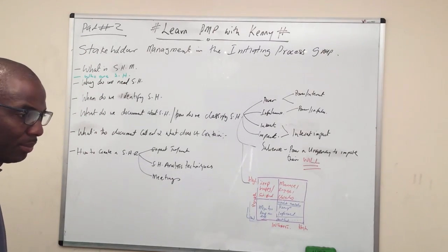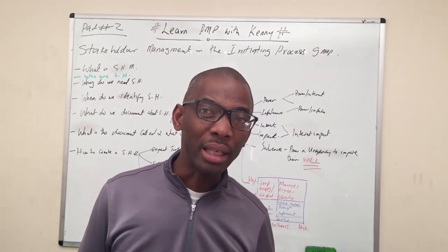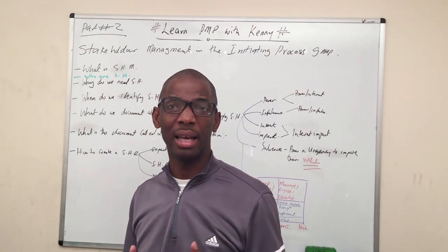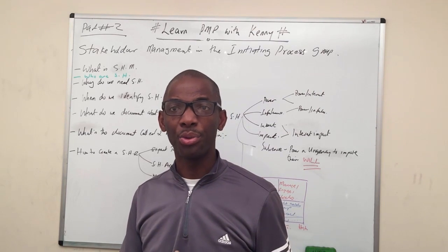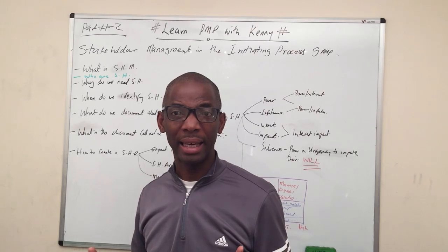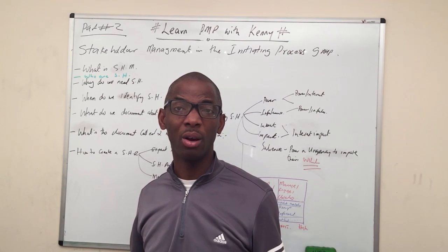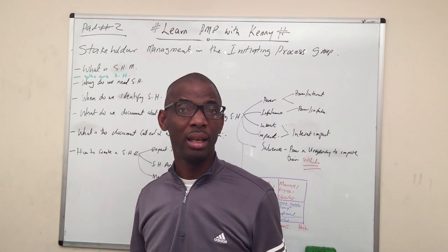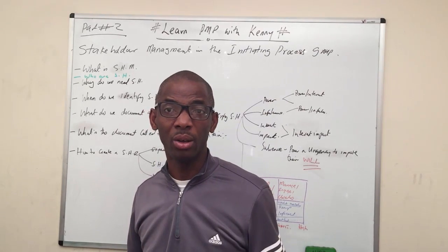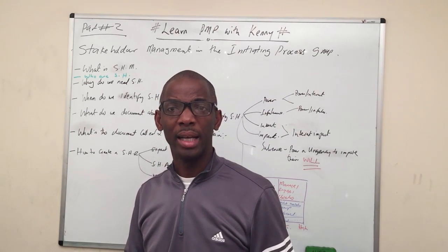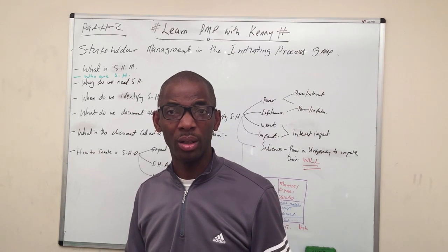stakeholder register. Now, note this, the stakeholder register that is built at the beginning of the project, at the initiation phase, doesn't end there. It is used throughout the entire project and can be modified. Stakeholders come and go. A stakeholder may be with the company at the beginning of the project and may decide to leave to join another company. Are you going to keep emailing them when they're in the other company? No, of course not. So as a result of that, the stakeholder register is constantly updated as well, which as